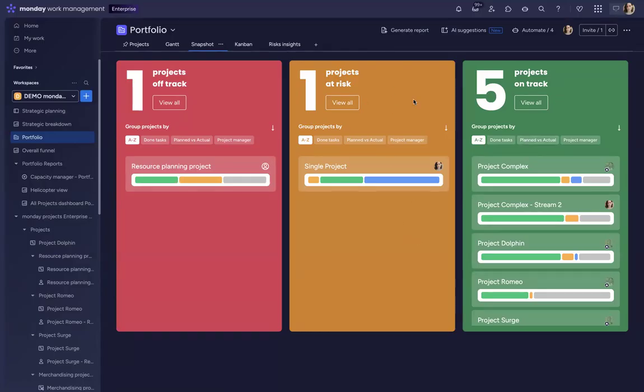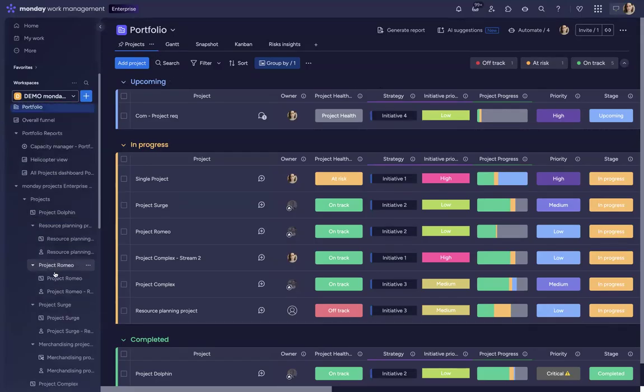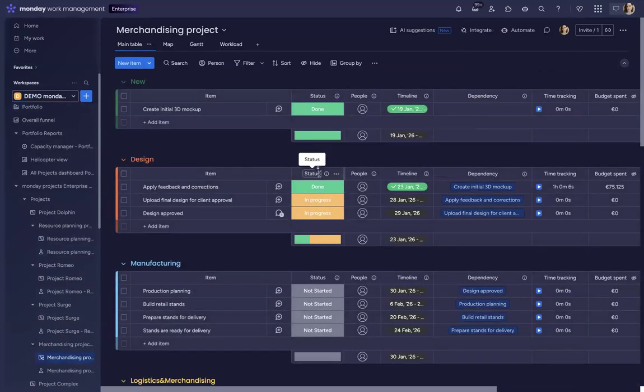But when it comes to the tasks, things change a little bit because the tasks are something that is on the ground level. So when we have the project, first of all, we will need to decompose it into tasks. And that is something that I will show you. Actually, Monday supports many types of projects. So you can associate the project schedule with the project type, and those project schedules can be created automatically. And as a result, you have something like that as your project schedule, which will consist of tasks that should be done.